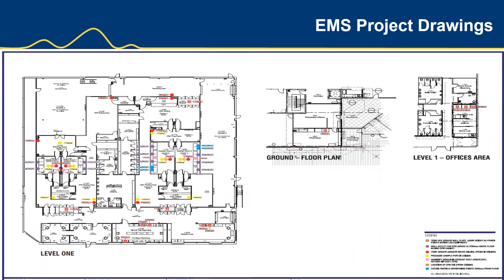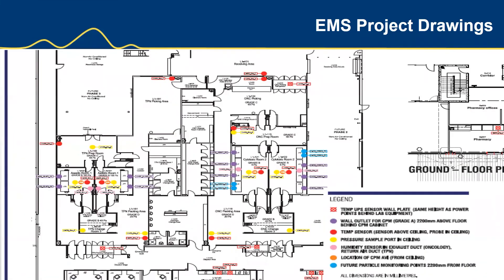Here's an example of that facility with details of the locations. We have a legend, and this example will have sensor locations colour-coded and marked out. It's really important to understand where everything is going. Drawings should be as detailed as possible, right down to the heights of the wall plates and sensors. The risk assessment should also detail this information. Remember, once the physical installation takes place, it becomes costly to change — so putting a good amount of focus on locking in cable and tubing runs and final sensor locations is key. This should all be signed off in stage three of the project phase. During the project kickoff meeting and subsequent weekly or bi-weekly meetings, these should be addressed in the plan outlined, and all stakeholders should sign off the drawings.